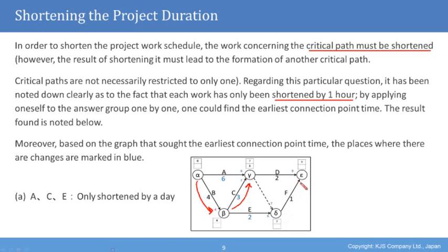So it could be 8, but we also need D to finish. And D takes 2 hours, and 7 plus 2 gives 9. So even though it takes 8 hours to finish, you'd be finishing F by 8 o'clock. That doesn't mean anything because D still takes 2 hours after you've reached gamma, which means it would take 2 plus 7, which is 9 hours. So the earliest time that you can get there is 9